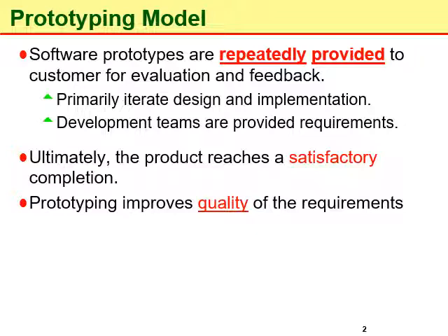So prototyping can improve the quality of requirements and specifications provided to developers, because in this approach the users or customers are in close contact with the development teams. Therefore it is assumed that the requirements have been clarified. There is no ambiguity in the requirements. Similarly, the requirements may be complete. Therefore no change requests might arise in the later stages of the project.